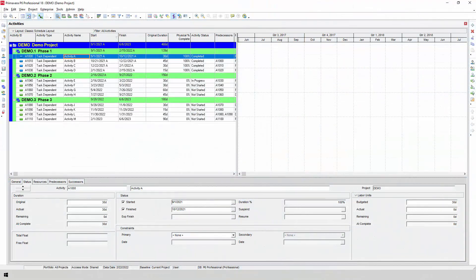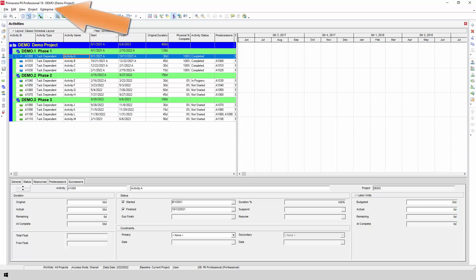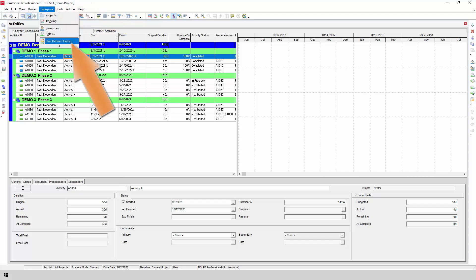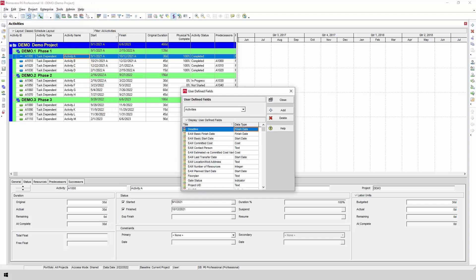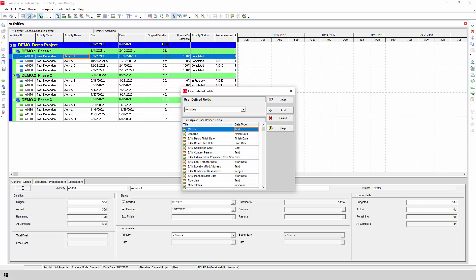To get started, we need to decide which activities to include from P6. The easiest way to do this is to insert a user-defined field into your schedule. From the Enterprise menu in P6, go to User Defined Fields. Then, click the Add button to add a new user-defined field. Name your field OnePager and make sure it's a data type of text, as shown here.